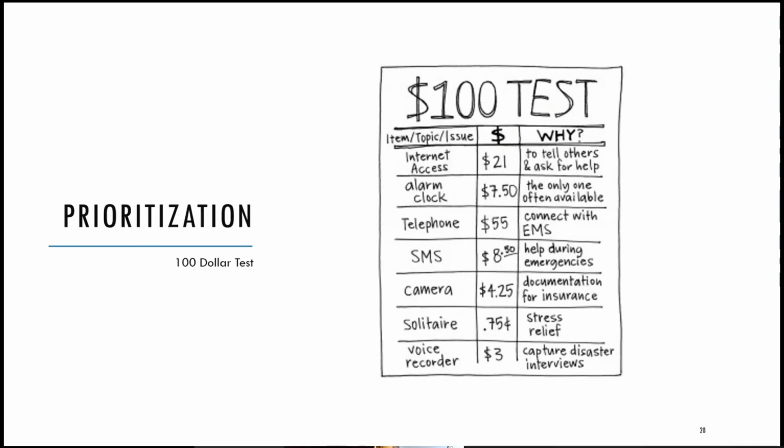And the last one, the $100 test, is a good way to handle requirements from different departments. Everyone gets $100 and can spend them on requirements how they want. One requirement, $100. If it's the only one that's important for you, why not? You can also split it in whatever way you want. The users decide how to spend those $100 and how they want to split it. They have to think which requirement is worth what. In the end, everything will be summed up and you can clearly see the picture through all departments.